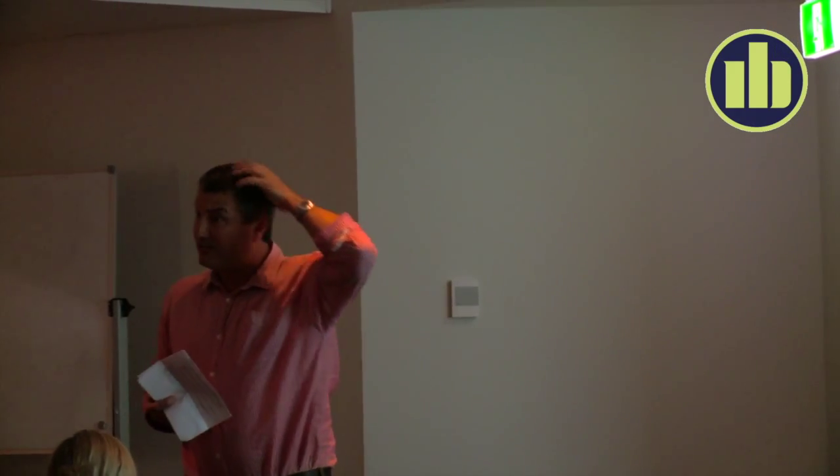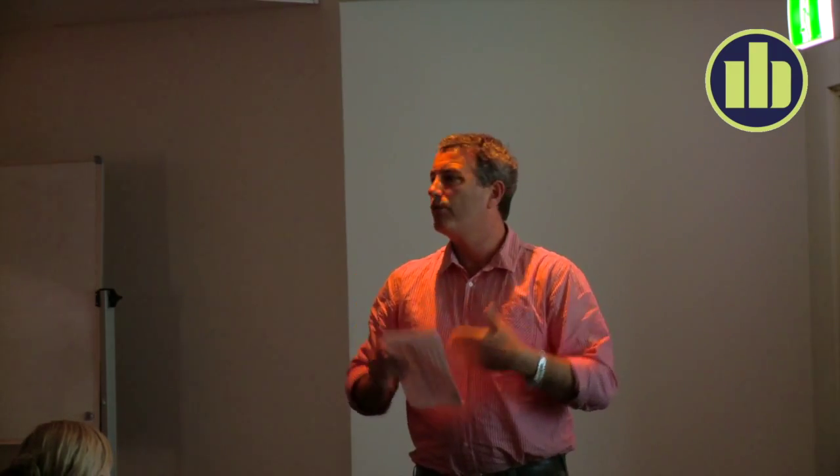If we can start to engage the subcontractors, this is the real challenge, and perhaps that can be going back to an old school idea of nominated subcontractors, which was ditched because of the risks of choosing subcontractors for builders. I wonder now in the future whether that actually has less risk than not engaging them at all. So it's possibly, go back to what we already know. But this concept of plan to build, so don't rush and get on site. As soon as you get on site, if you don't know what it is you're going to build, you're going to start losing money. So basically, take the time to work it out.